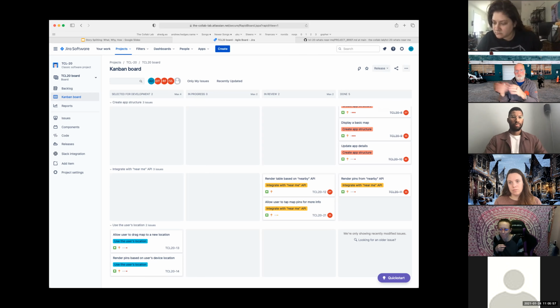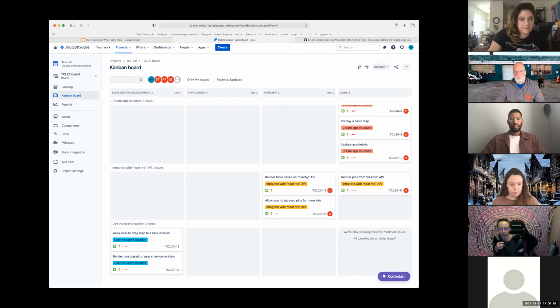So that's the traditional Scrum stand-up. But there's another type of stand-up, which is walk the board, and that's where you start with stuff that's in review, and you literally just go through the board and talk about all the issues to identify the state. Maybe somebody forgot to update the board and you can move it to done. Things are starting to stack up in review, so you talk about that as a team and say who has time today to review these things, and then clarify any upcoming issues. So we'll do walk the board style a little bit.